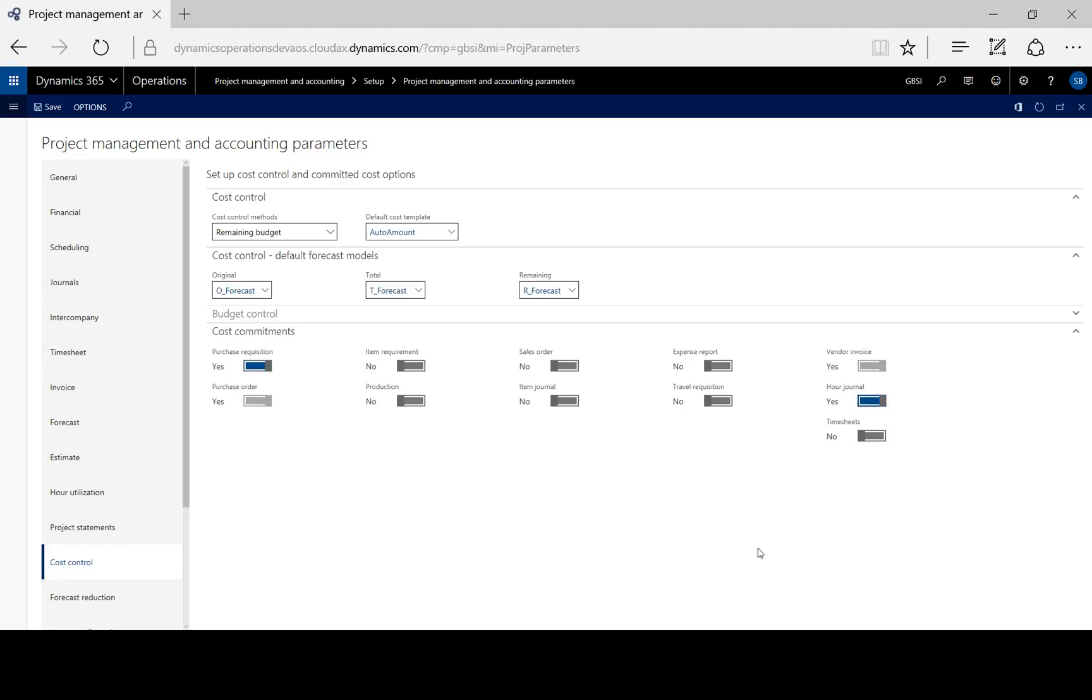When these transactions are submitted to the workflow, the project budget is checked and the available budget amounts are reduced.